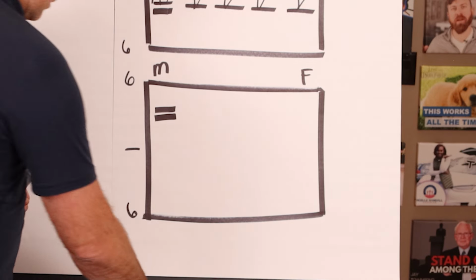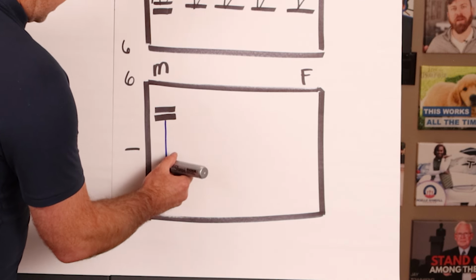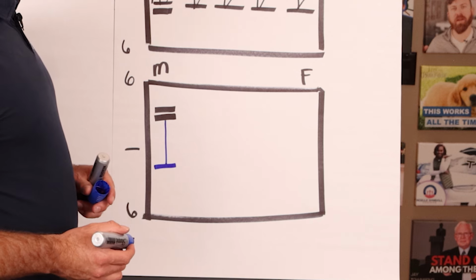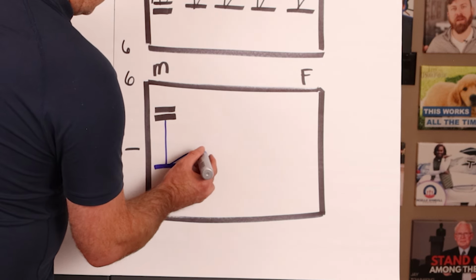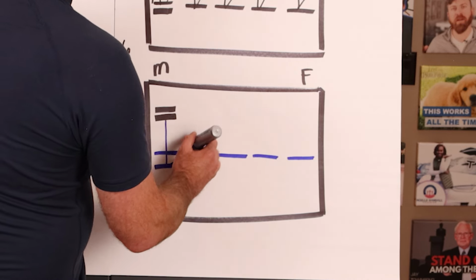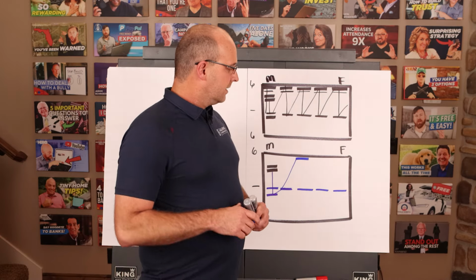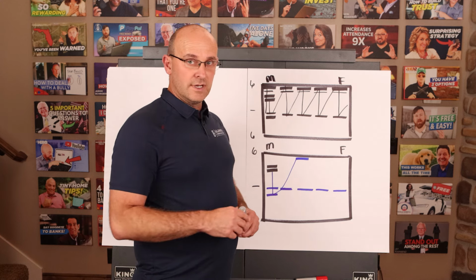Now, like I said before, then your superintendent will go to the Trade Partner Weekly Tactical where they do the 6-week look-ahead planning and weekly work planning. And then that is taken and used for the afternoon foreman huddles, where the foreman plan the next day, and then literally that's taken the next day to orient the workers. So that's the system. So the superintendent has the blue after the other items.